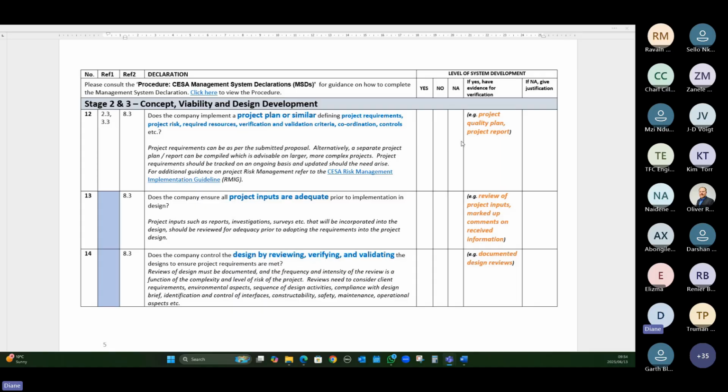The only issue I have with using a stage report as evidence of planning is that if you have risks that are associated with your client or your external team, you can't really pull them into your report. So that needs to be documented internally somewhere. Another fantastic document that I've recently seen being used as a plan is a project activity register, which allows you to list all the activities within the project. This could be risk items, objectives of the project that you want to achieve, or feedback that's coming in. It's one document that allows you to list all your planning issues and track them, assign them to someone, follow up, and close them out. But very important, put together a project plan.